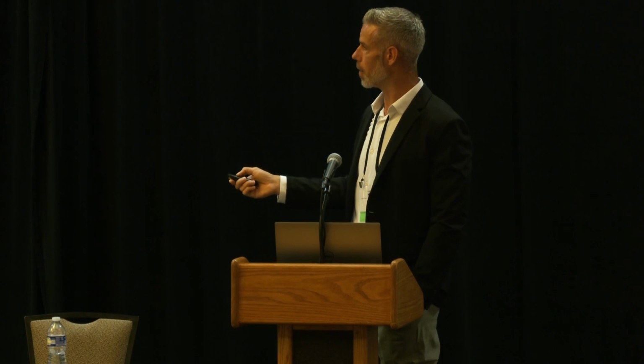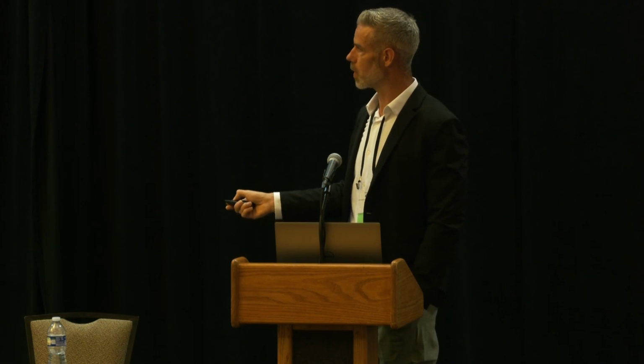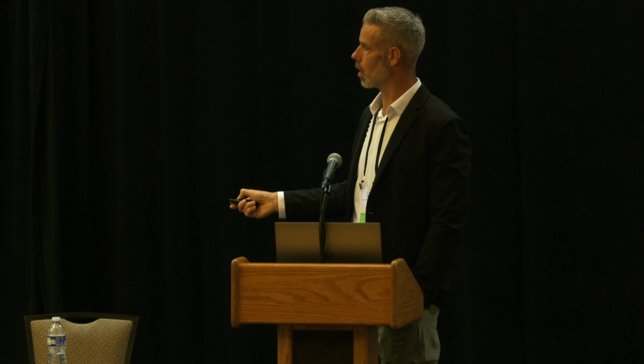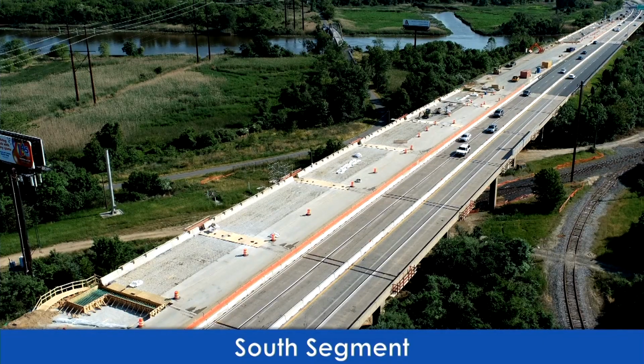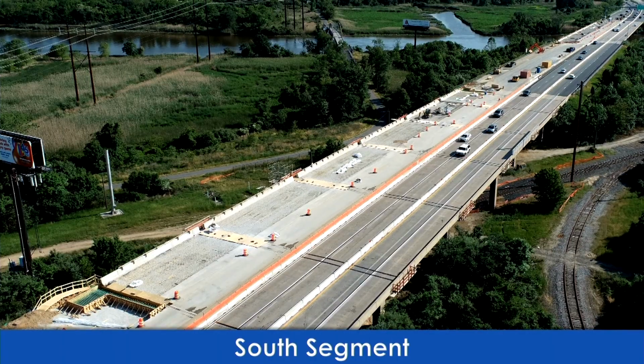So what they ended up doing was, once we hydroed, they didn't want heavy equipment riding on it. So they hydroed this side first. This side is milled, and they would just run the trucks here until they poured this side and then flip-flop. Then they would hydro that and pour that side. And throughout, we did create different temporary access points in the barrier, depending on what traffic was dictating that we could do, to allow better access into and out. Because as they start removing all those joints, you only have so many steel plates and room to work, and it got really tight.